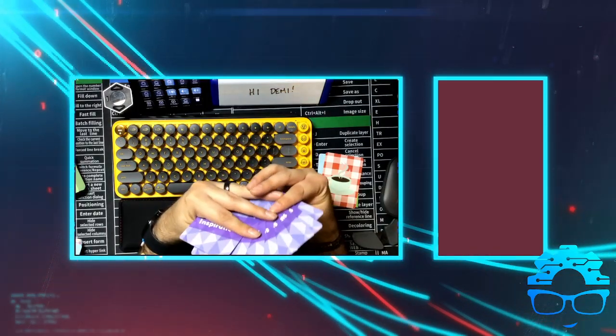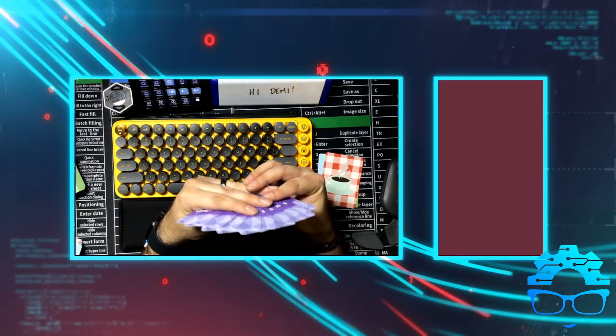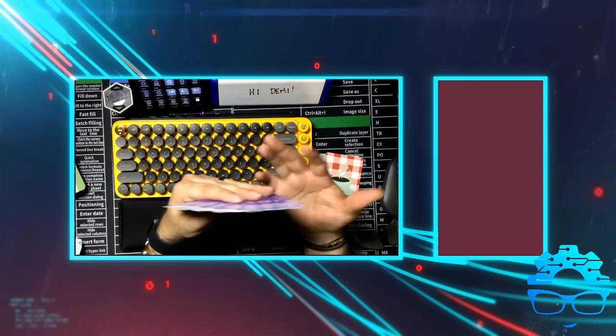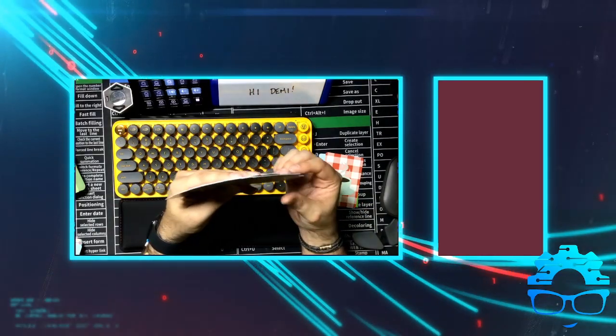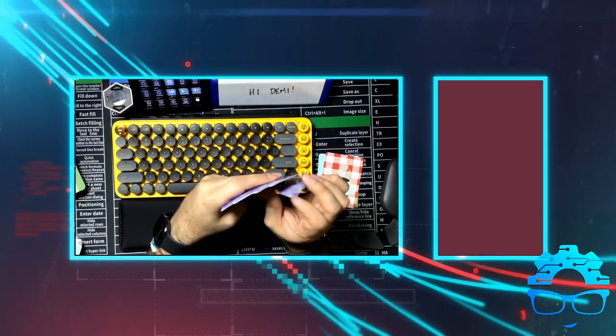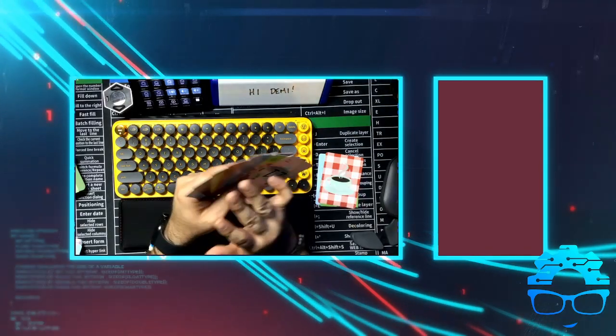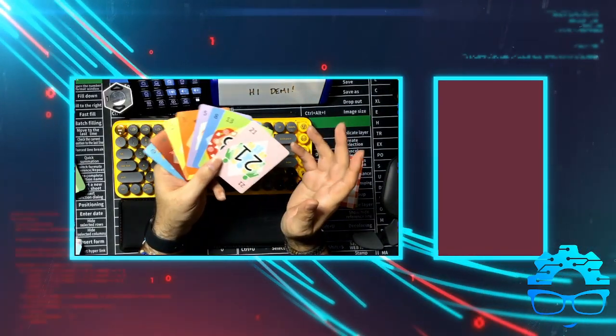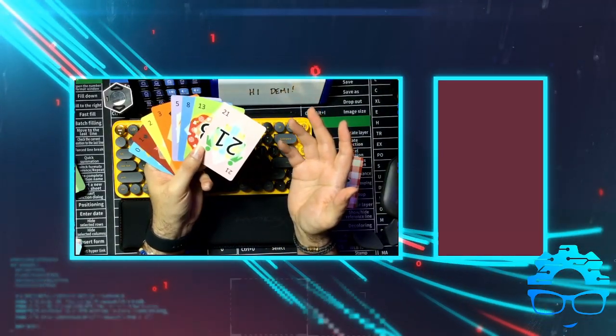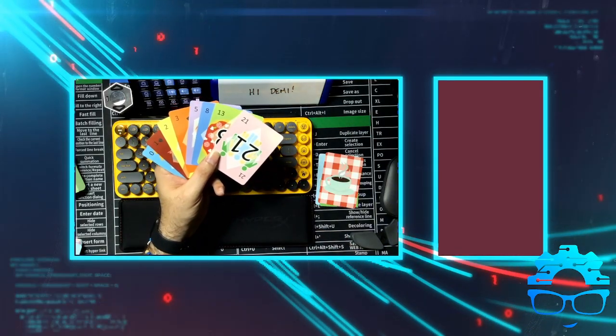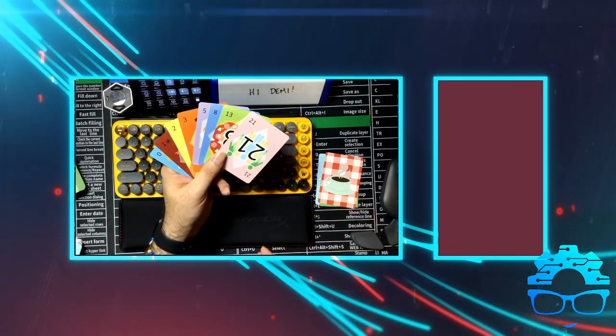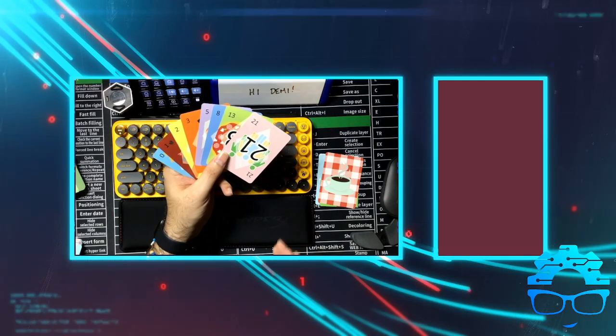And so everyone holds these face down. We review a task that's on the board, and I call for everyone to choose a card that represents the amount of points or the complexity of that task. Now, it's very important for the manager who's in charge of this to identify and establish the rules.